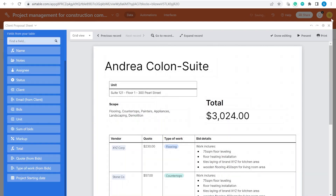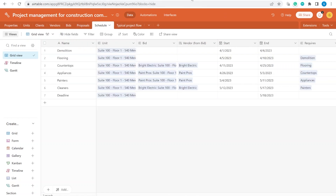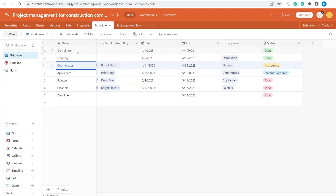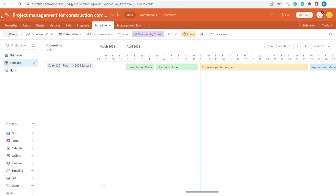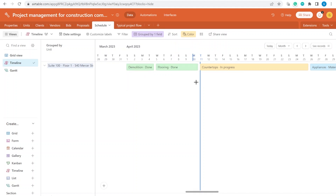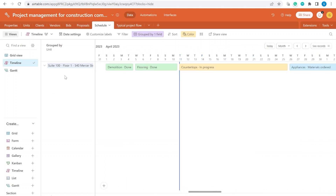Let's assume the proposal was already sent out and approved — the project can now start. Once we have the project starting date, we move to the Schedule table. Inside the Schedule table we already have an existing project linked to unit 100. Each project element has a specific status. We also have a timeline view where the color of the tiles represents the status: green means done, yellow means in progress, blue means materials ordered.